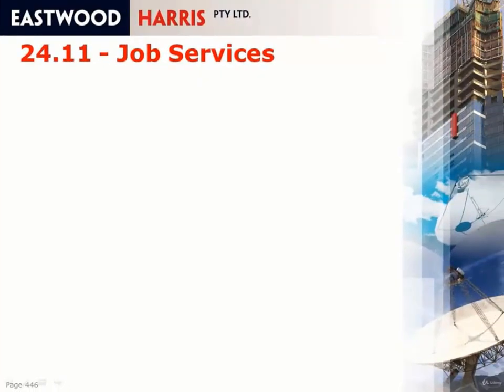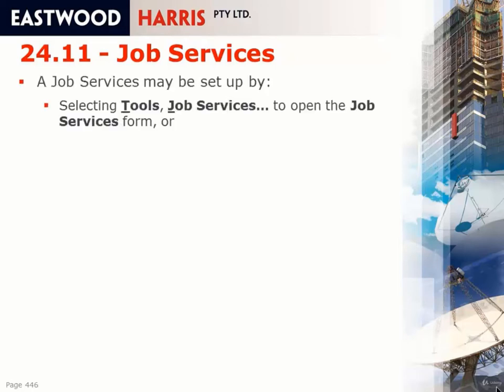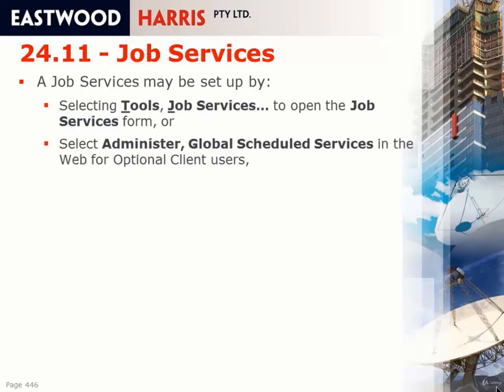Job services. Job services is a tool that allows you to perform certain functions on the database on a regular basis and program them to happen. First of all, you select Tools, Job Services to open up the Job Services form, or you can select Administer, Global Schedule Services in the web for optional client users. So if you're using the professional client, you can set up job services in the client, but if you're using the optional client, you need to actually open up the web tool first.